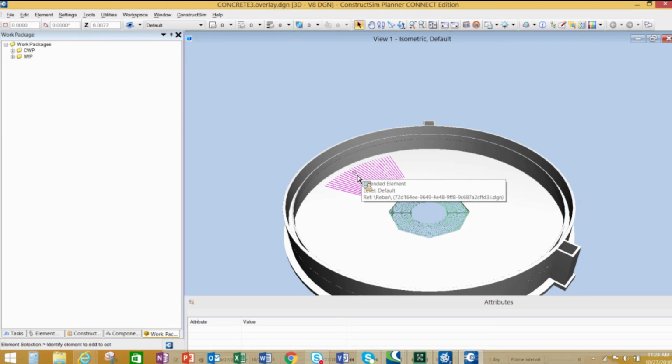with bending rebar. The second thing is why this is important is it gives you an idea of the scope of the work. So being able to work package your rebar and concrete, you know exactly how many hours are associated with that, how you can schedule your pours, and how you can schedule the rebar to be laid down for that. So when you start looking at manpower to associate to that, and the opportunity to follow that through the entire project life cycle, from engineering all the way through to construction execution.